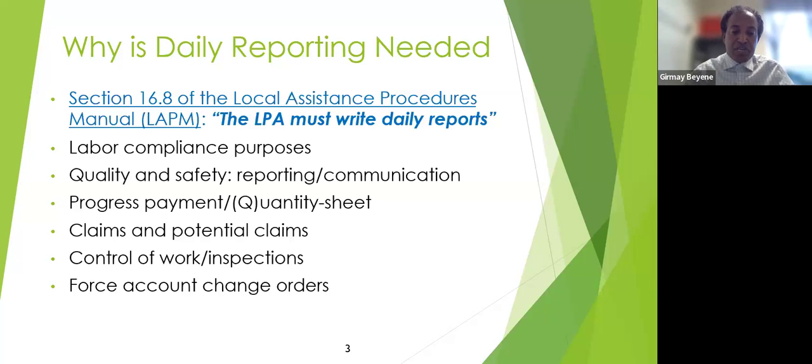The other thing is for potential claims. For any claim or potential claim on a construction project, we need daily reports to defend our position, the local agency's position, against the contractor or any other claim. So complete and adequate daily reports are important for you to protect or defend your position. When you go to arbitrations or other places, you're going to need daily reports to defend your position.